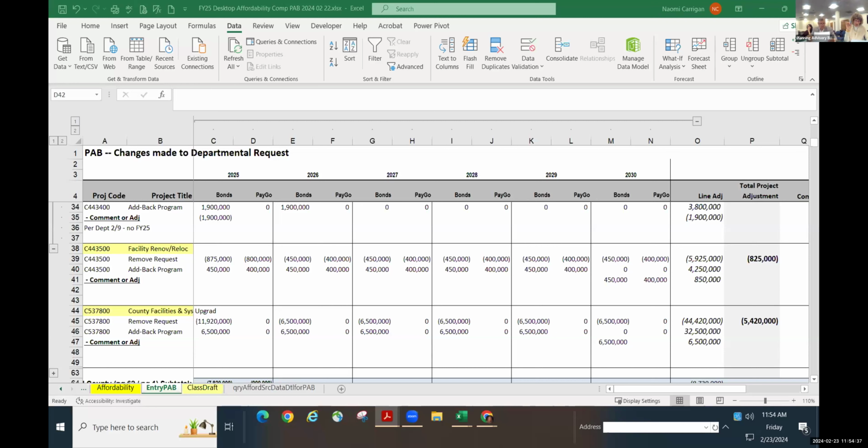So could we do anything differently for 28 and 29? Design, we need all of the design funds, I'm assuming, for 27? Yeah, because in order to sign a contract, I have to have all the funds available. If you're looking to add something in 28 or 29, you could probably bring up the 30 costs to those to work on the site remediation earlier.